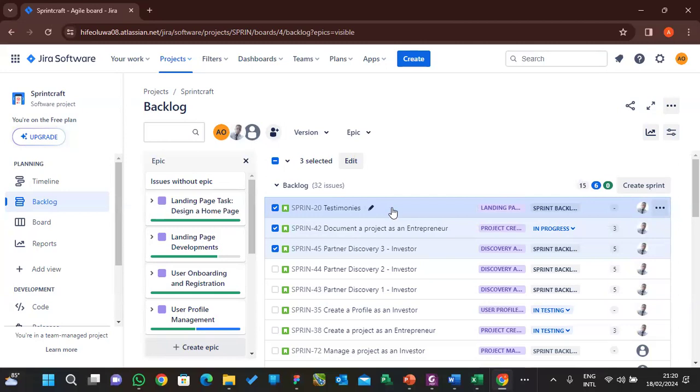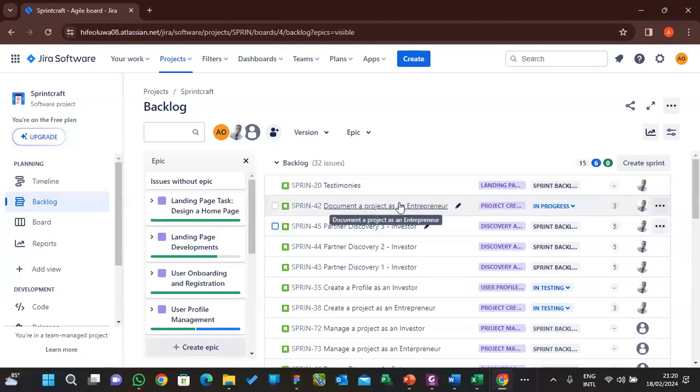So the next thing you're going to do is what they call product backlog refinement. You're going to use that DEEP criteria to clean up your backlog. When you are doing product backlog refinement, you are considering majorly 3 things. One is to size the user stories. Size them means adding story points, like estimation, like what we have here, 3, 5, and all that. These are story points, just size.